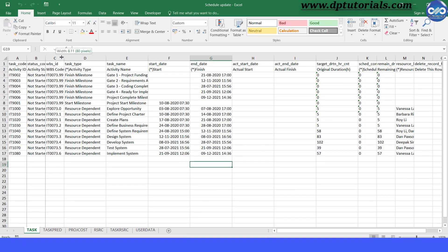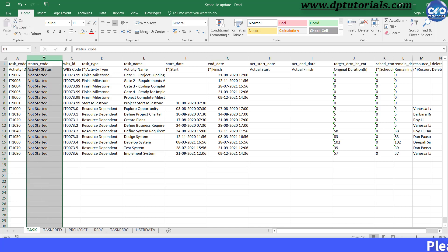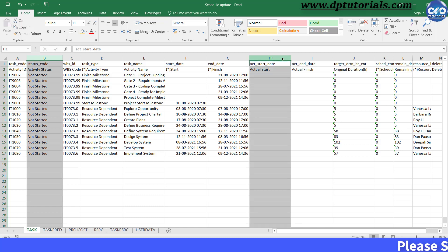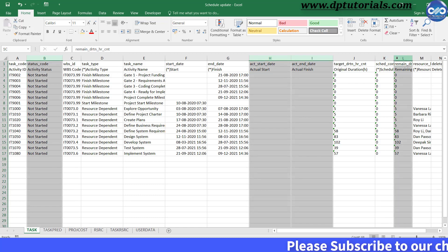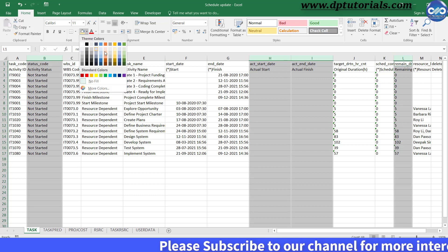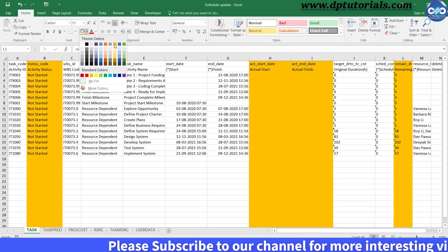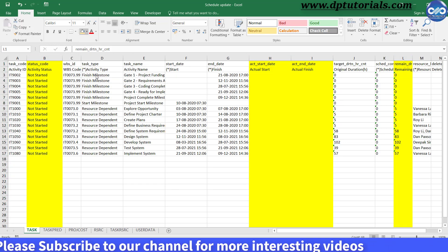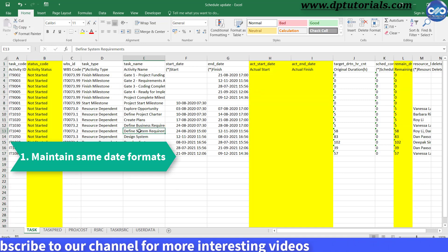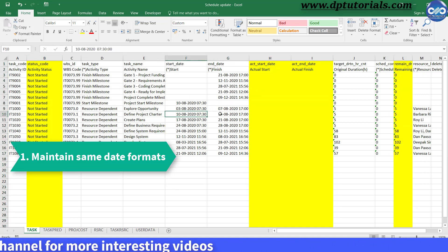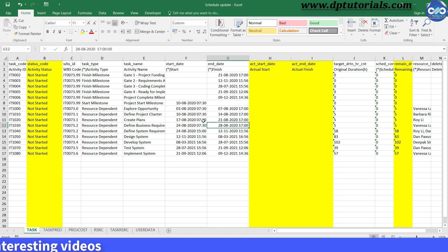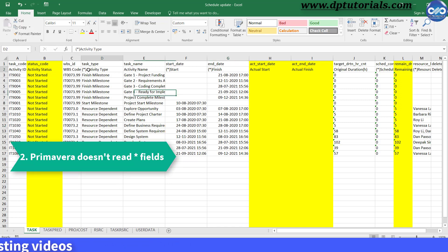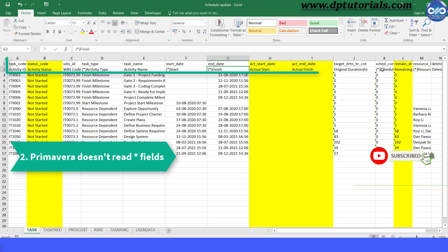You should be asking your team members to update only in the columns of Activity Status, Actual Start and Finish dates, and the remaining duration. Here you need to remember two things: that we maintain the same date and text formats as per Primavera, and the other thing is that Primavera P6 doesn't read the columns containing the asterisk in the headers.